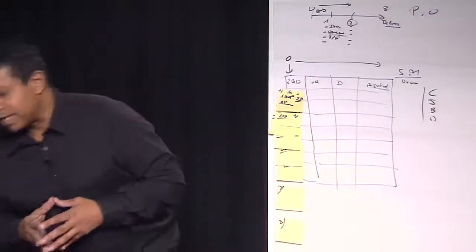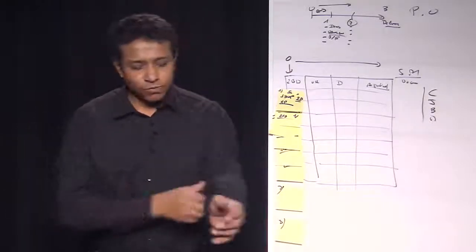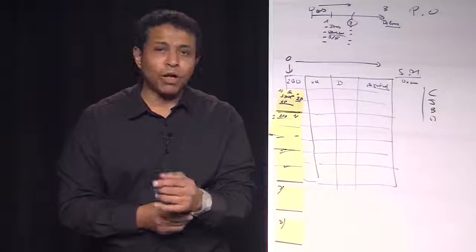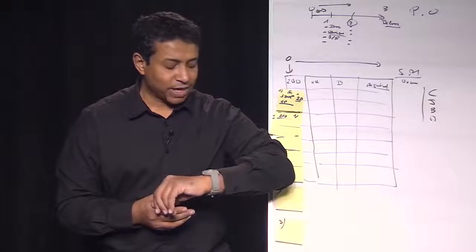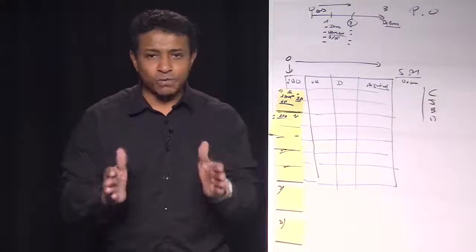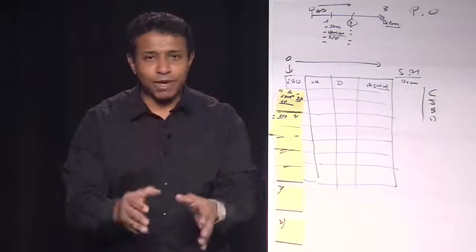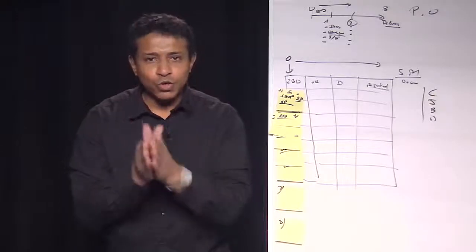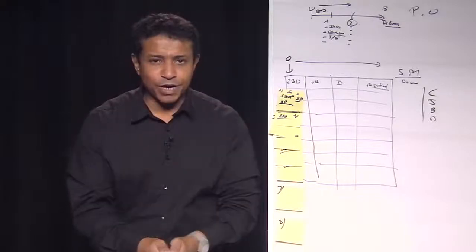So that the stand-up meeting can be efficient, the stand-up meeting cannot last. Which means what? At the beginning of this meeting, with a simple watch or with a time box on your iPhone, you just say, okay, we're going to do a stand-up meeting for now 10 minutes or for now 2 minutes, which means that a stand-up meeting is not made for discussing problems, bugs, or stuff like that. A stand-up meeting is only made for one thing. Who does what as a dev? What task do you take? So this is the first meeting in the morning.